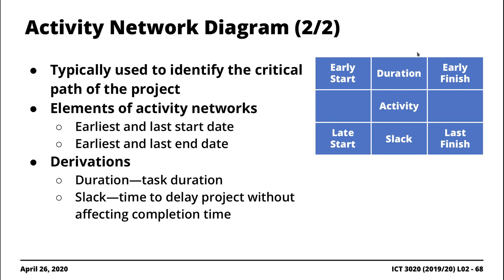Each activity is represented as a block. The block has the early start date on the top left corner, followed by the duration, and then the early finish date on the top right. The middle shows the activity name. The bottom row contains the late start date, the slack, and the late finish date in sequence.